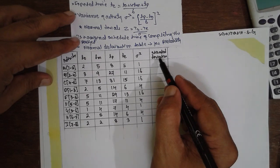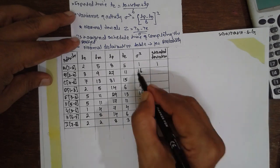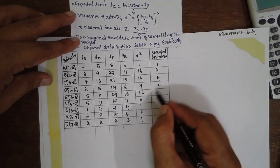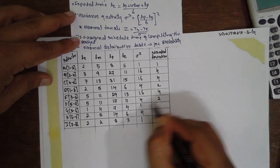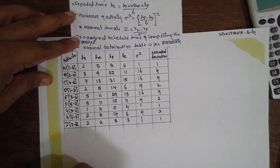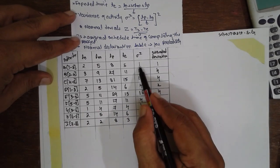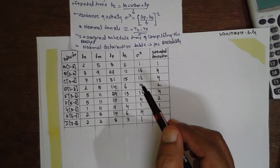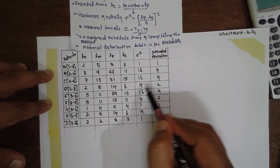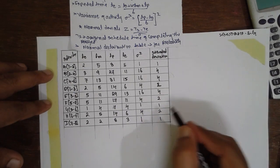The standard deviation is found by taking the square root of the variance. Root of 1 = 1, root of 16 = 4, root of 16 = 4, root of 4 = 2, root of 16 = 4, root of 4 = 2, root of 1 = 1, root of 4 = 2, root of 1 = 1.